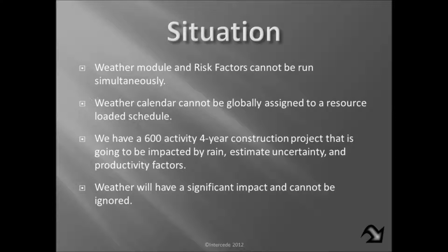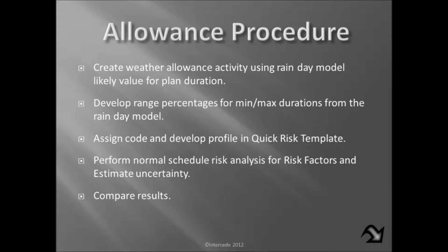And we still have our 600 activity construction project, and again, weather is a significant impact. Now I have, and I'll show you this when we get to the spreadsheet, reduced the impact of weather here, because I've basically said any rain day now becomes any day with precipitation greater than 2/10 of an inch, or 5 millimeters. So the first one, the allowance, is pretty straightforward.